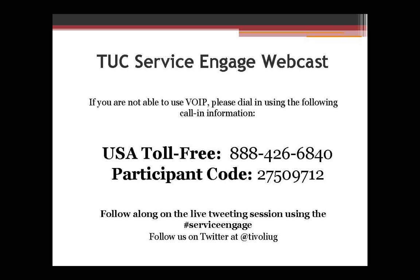So you mentioned the Kanban board, which I think we should jump into. We're kind of out in the Wild West with the way we manage our work. We use a tool that IBM has called RTC. It doesn't really matter what it's called. We have all of our business stakeholders write stories, like desired outcomes they would like to see implemented in the site. They get put into this tool, and then our product management ranks these things from lowest to highest priority. When people on the team free up, we take whatever is at the top of the list and start working on it.